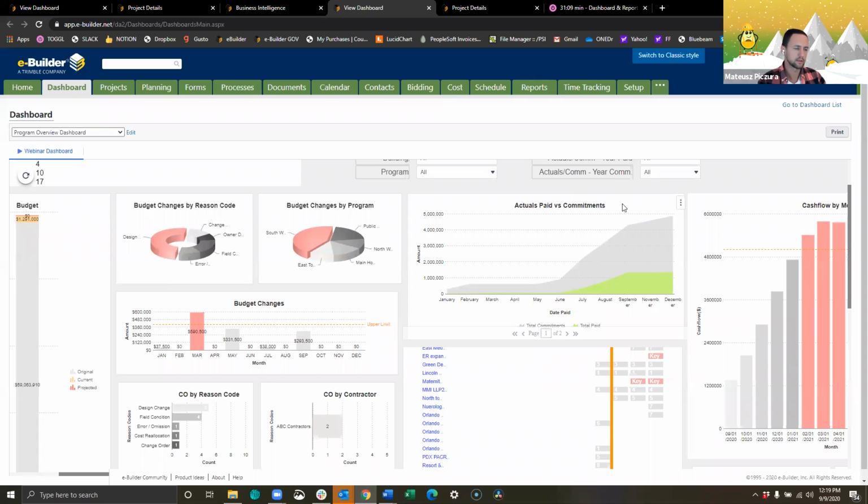With this, I do want to point out that one of the things we tracked in my previous company was our performance on how fast we could get our contractors paid, or how many times we went over the time frame. We always wanted to make sure that we hit the contractual obligations. So what you can do here is show another metric that shows the number of days from invoicing to payment for a contractor or for professional services, and be able to act on those things if needed, if that happens to be an important measure for your organization.